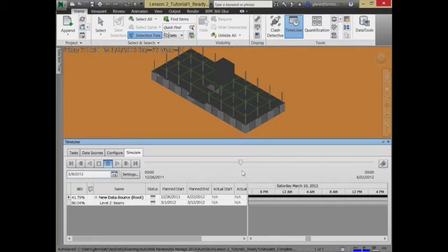And that's very helpful. There's a lot of people doing interesting research right now where you have models like this and you have a camera on site, and you use that camera to figure out if visually you're seeing what you expect to be seeing, and whether the project is ahead or behind schedule, just by comparing the visual images. So this whole idea of 4D simulation is very, very powerful.